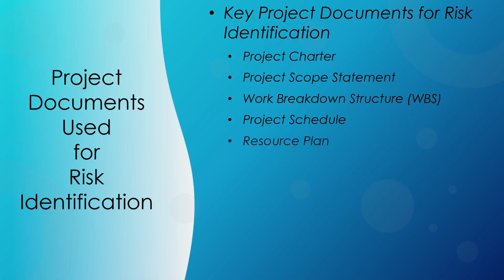The resource plan details the resources required for the project, including personnel, equipment, and materials. It provides an overview of resource allocation. Reviewing the resource plan can help identify risks related to resource shortages, skill gaps, or resource conflicts.